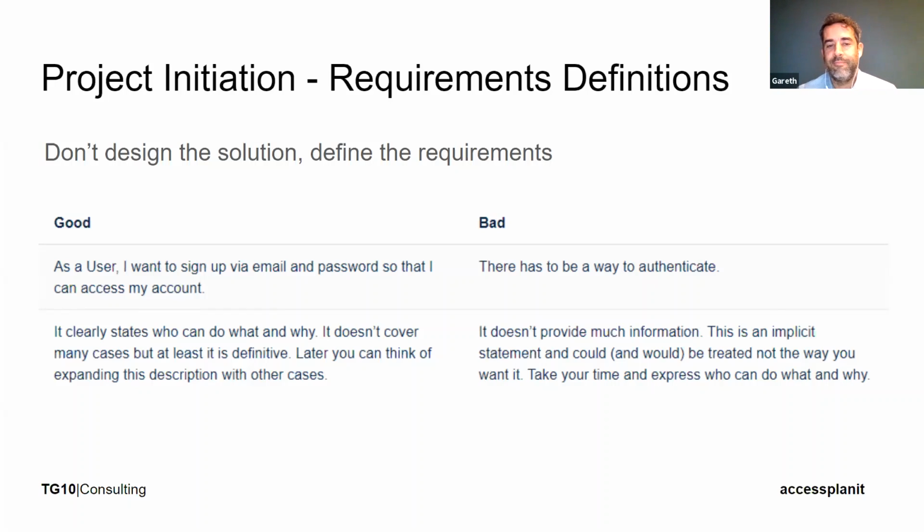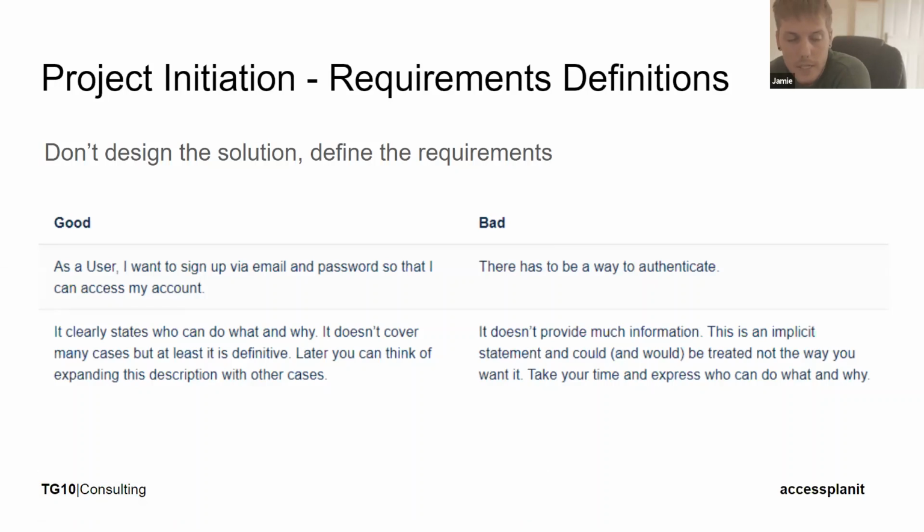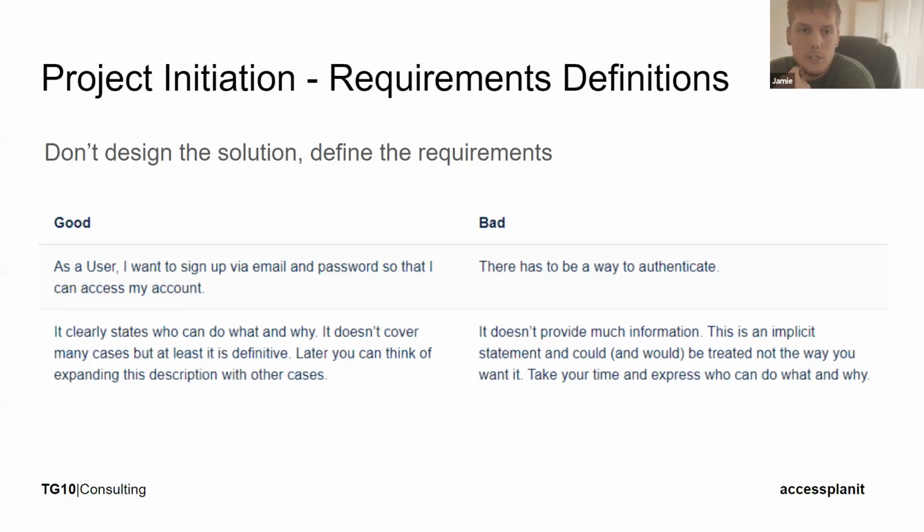So I think there are a lot of people who've dabbled with requirements definitions and documents, and we see these spreadsheets, long lists of requirements. And I think it's very easy to lose sight, while building that document, of what we're trying to achieve. So it's really important to spend the time honing the requirements document so we can clearly define exactly what everybody's after. Because I heard a statistic, about software specifically anyway, that 80% of the issues that arise during software development or implementation were due to poorly defined requirements.